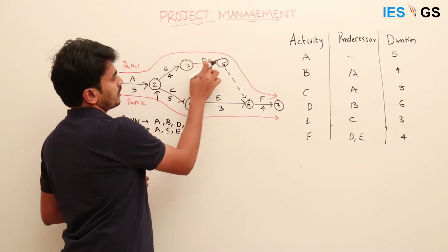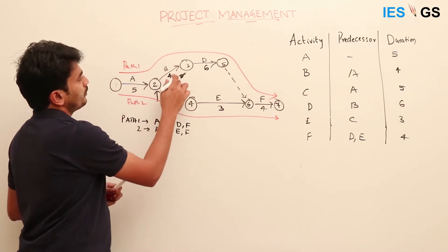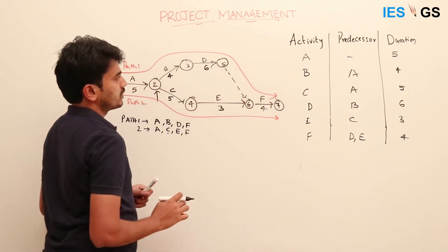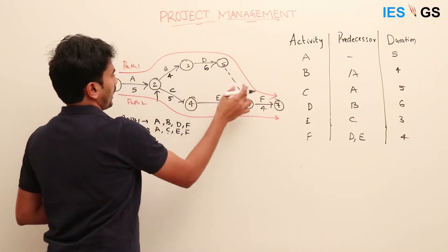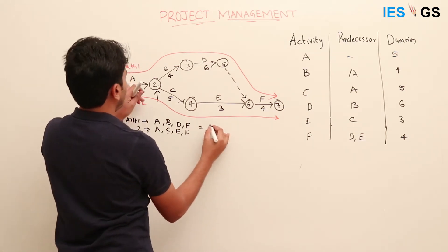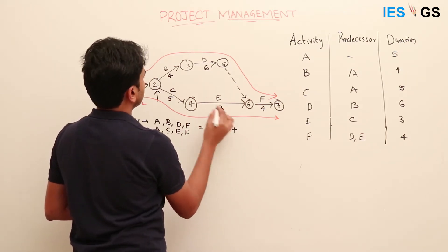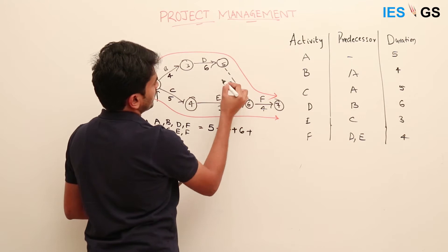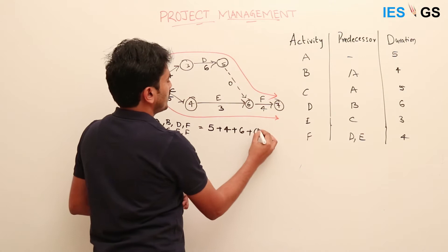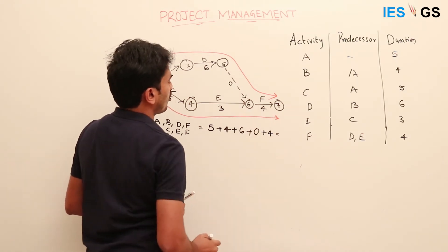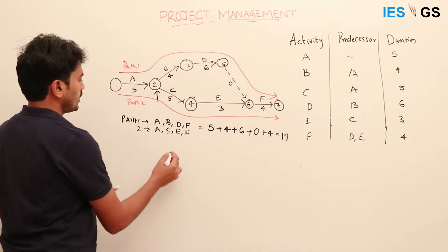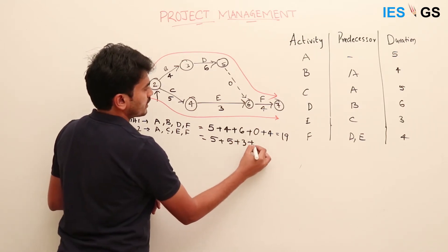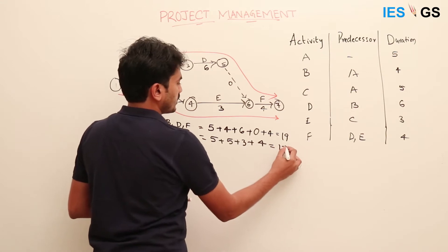Activity A is common to both paths and takes five days. B and D are parallel to C and E. Calculating Path 1: A takes five days, B takes four days, D takes six days, the dummy activity takes zero days, and F takes four days — giving a total of 19 days. Path 2: A takes five days, C takes five days, E takes three days, and F takes four days — giving a total of 17 days.